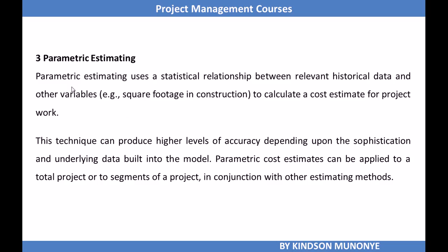Parametric estimating uses a statistical relationship between relevant historical data and other variables to calculate a cost estimate. So talking about parametric estimating, think of calculating using known historical data and other variables. It produces higher levels of accuracy depending upon the data that is used.